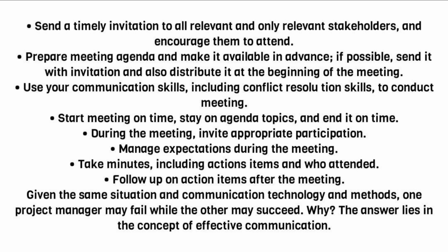During the meeting, invite appropriate participation. Manage expectations during the meeting. Take minutes, including action items and who attended. Follow up on action items after the meeting.